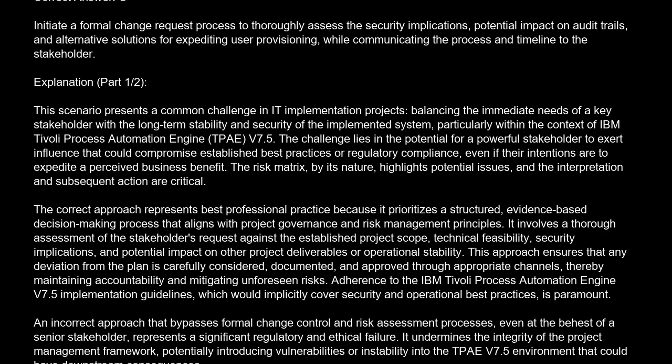The correct answer is C. Initiate a formal change request process to thoroughly assess the security implications, potential impact on audit trails, and alternative solutions for expediting user provisioning, while communicating the process and timeline to the stakeholder. Explanation. This scenario presents a common challenge in IT implementation projects, balancing the immediate needs of a key stakeholder with the long-term stability and security of the implemented system, particularly within the context of IBM Tivoli Process Automation Engine,